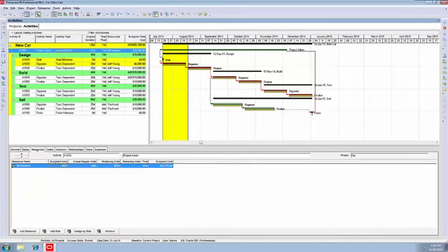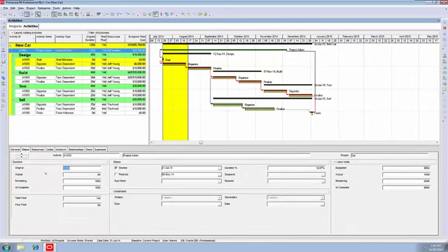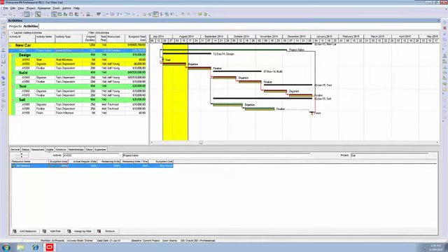Now we do the resources for our level of effort, project admin. And notice that the computer has put in figures from the data that we've just put in. So we said 100 days remaining, which meant 20 days had been done. So let's put in actual regular hours of 160. So 20 days at 8 hours a day, 160 hours.